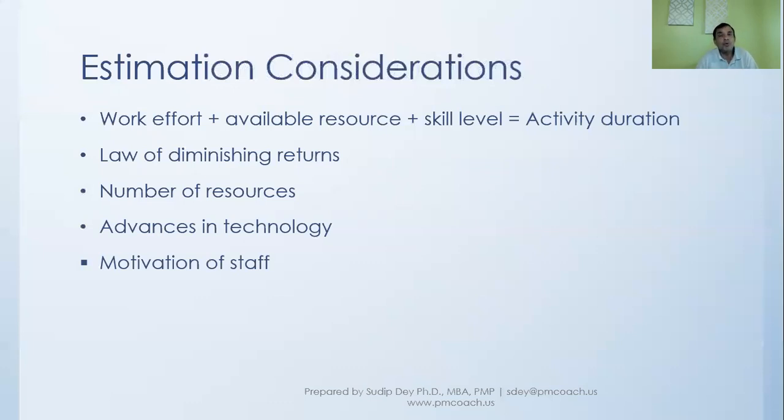For example, if a work can be done in 3 days, and to some person you say, okay, I'm giving you 5 days, that person will take 5 days because the work will fill that time. So that is Parkinson's law. And so we need to always be motivating the staff and make sure we don't let that procrastination creep into the project effort.